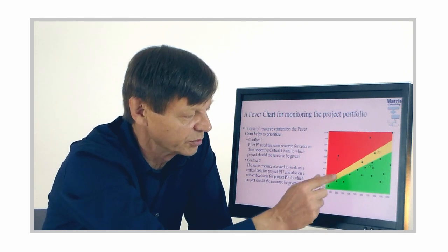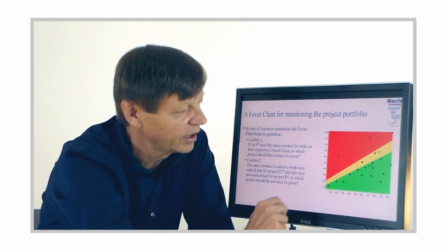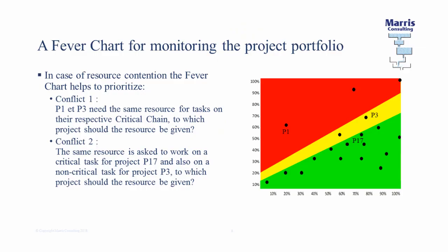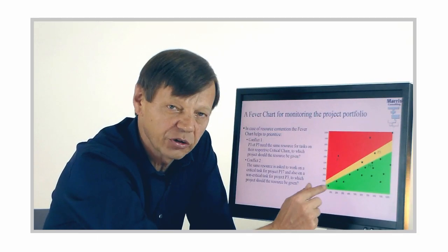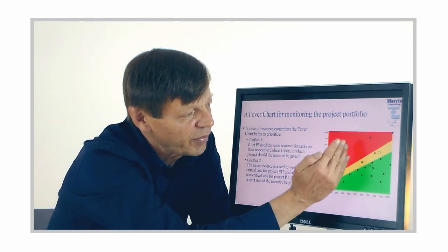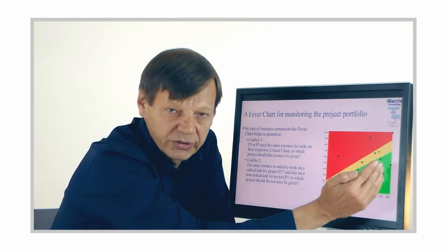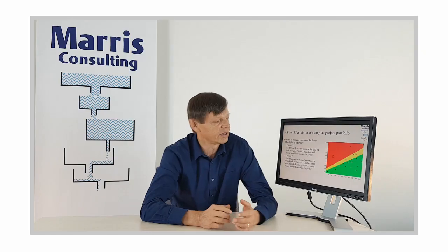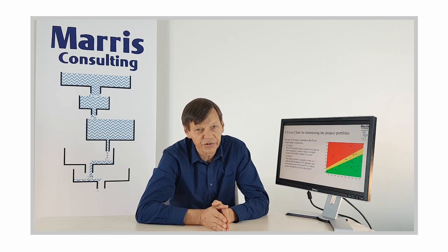So it's perfectly reasonable for Susan to come and work here, because that is a really worrying one. That's a project that had a problem at birth. Maybe there's a problem with a client that can't decide what he wants, or maybe the proof of concept is not going well. Anyway, there's something going on here which is completely unusual. So that management, instead of spending all its time firefighting down here, is encouraged to go back upstream and identify the cause of problems initially while there's still time to react.